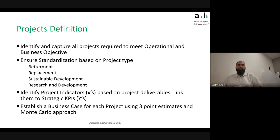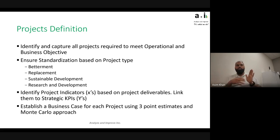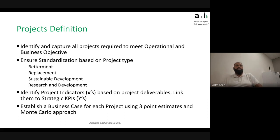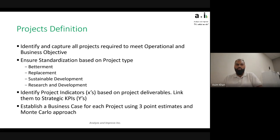Once you have that, identify project indicators based on project deliverables and link them to strategic KPIs — making sure each project shows how much of an impact it will make. If a KPI (Y) is made up of three projects, count X1, X2, and X3 to see how much gap remains, ensuring there's no overlap in gains. Establish a business case for each project using three-point estimates and a Monte Carlo approach. Using a single-point estimate means missing out on risk — if a project supposedly brings $100 million in value, you need to know the probability or certainty behind that number, whether it's an average, P80, or P20. We'd always recommend at least three-point estimates — best case, worst case, most likely — and then use Monte Carlo to produce a business case or risk definition.